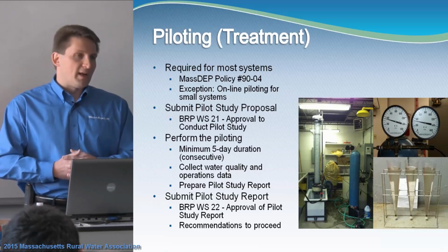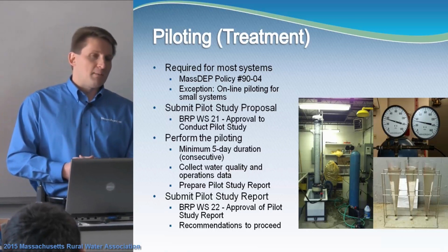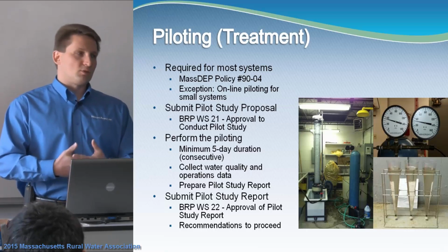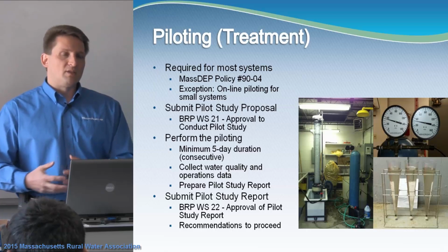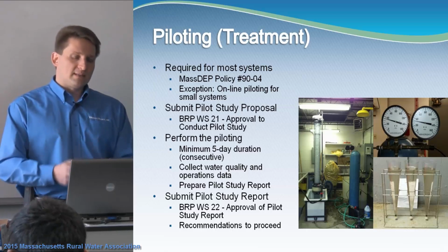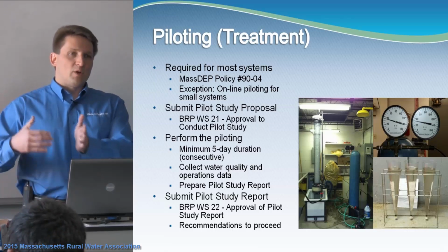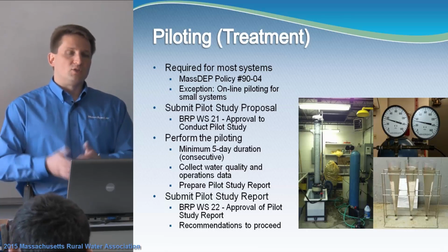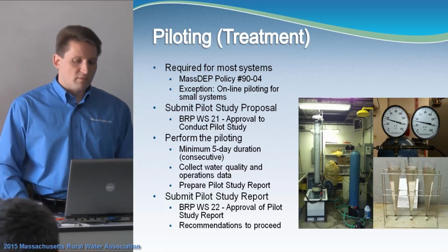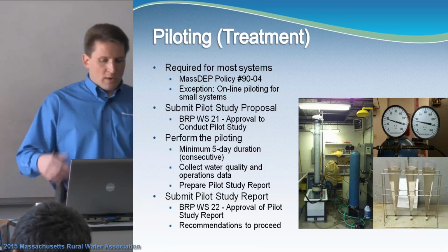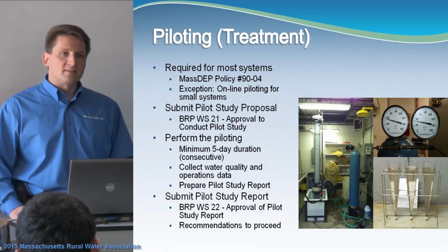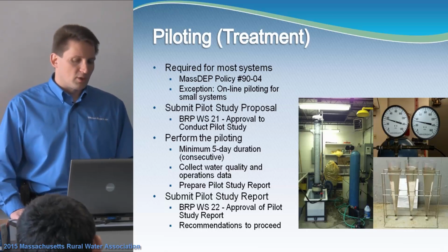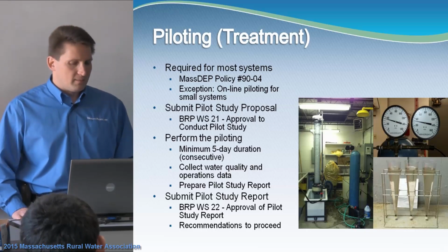There is an exception from what I understand, and you can do online piloting for very small systems, like say a school of some sort, where you don't have the time or the budget to actually do the pilot and then go into design. The DEP has the exception where you can actually install a proven technology and run it through its proof out period at that point in time. We're actually going to be helping out a small school in the town of Gill with that process. So it's pretty new, so we're looking forward to that, and it's going to be a USDA funded system as well.